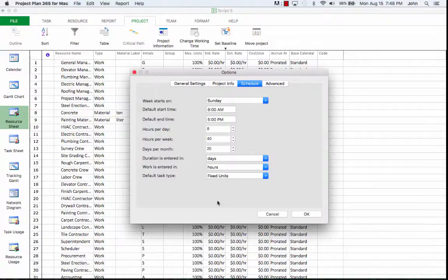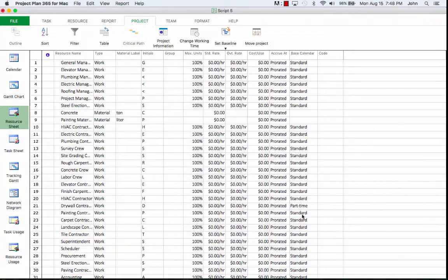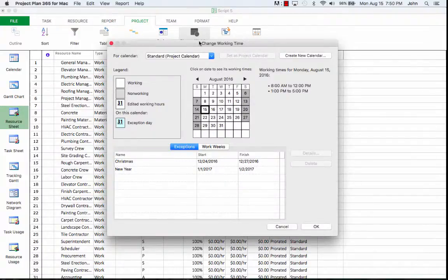Keeping track of non-working time is critical for making a project meet its deadline. If you don't want to have in your schedule a task that is supposed to take place on Christmas Day, you can add holidays, non-working time, to the project calendar. To model public holidays in our project, we'll modify the current project calendar to indicate the non-working days. And to do this, we'll again go to the project menu and click on Change Working Time. We'll use this quite often in this dialogue through this video to deal with these calendars.